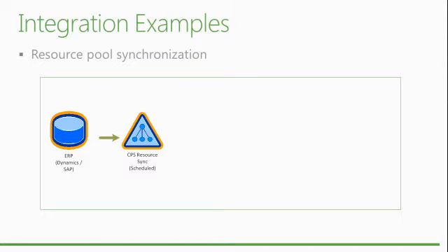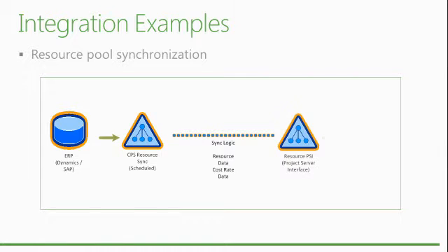We have a resource sync that we do that from. And then you can do some logic to then import that into Project Server. So as soon as you have a new starter, they are available to be resourced as soon as HR know about it. Typically that's done on a daily job or something like that, and it's done overnight. So the next day, as soon as HR knows about that, they will be in there. And you can do just resources, or you can also do cost rates as well. Effective to, effective from dates. So resources obviously change costs over time. You don't want to change your old project costs because you've upped the cost of your resources because of inflation or whatever.